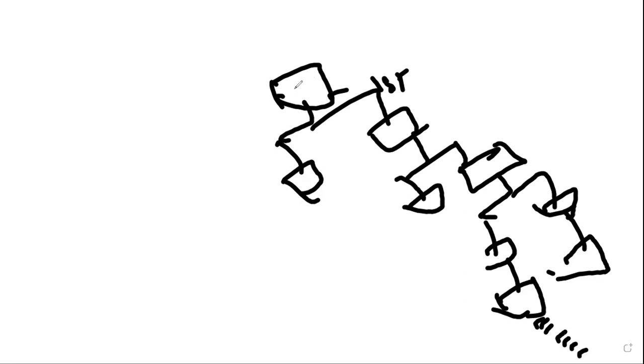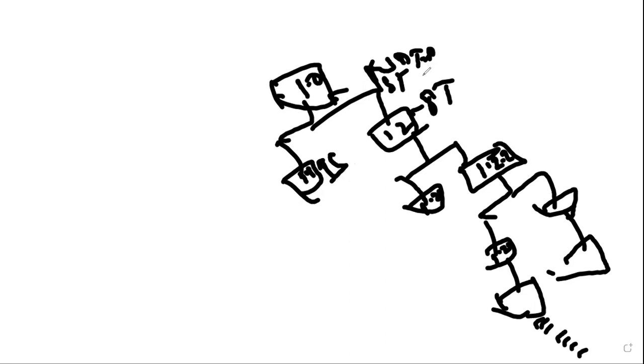So this WBS will have ID 1, right? 1.0, 1.1, 1.2, 1.2.1, 1.2.2, 1.2.2.1. So you're able to give the ID, and this is going to be airport, New Doha International Airport. This is passenger terminal. This is network, the traffic signal. So again, food code is broken into a number of WBS components until you come to the work package. In the WBS component, you are able to see two things. One is the ID given for the WBS, which we call a numbering system, and a small scope text description. Airport, passenger terminal, a small text scope description will be there.